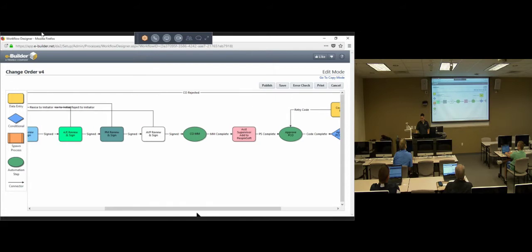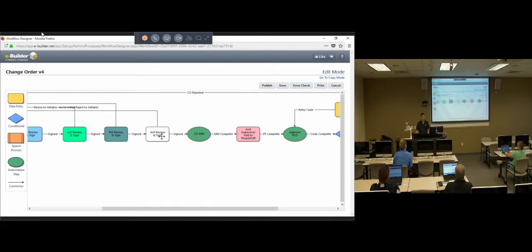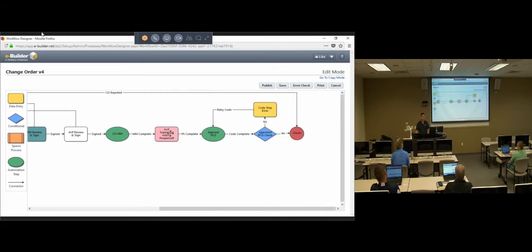But if Lee decides to approve of it, she signs it, the system will do something called a mail merge. It'll produce a document out of it, which then goes to the accounting supervisor. They need to file that away in PeopleSoft. And then that's it. It's an approved change order. When it becomes an approved change order, your commitment in the system will now reflect the updates. If you added scope, you increase the cost for a particular line item, or you decreased it, probably not, but whatever changes, it takes effect at that point. At this point right here.